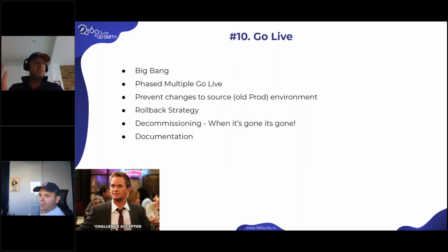The second thing is, you could decide to just bring everything and overwrite everything again, but you can't really do that if it takes many hours to migrate everything, and then you have to reconfigure things afterwards or repair things. Or at 360, we have a solution for that. Of course, we'll talk about that later, but we have a promotion tool where we can say, hey, identify the delta for me and bring it in some different ways that you want, so we can automate that.